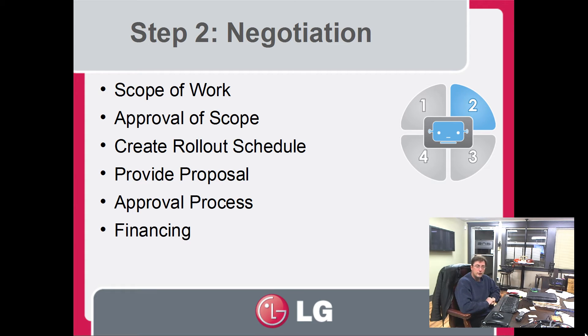From there, we do a scope of work. Once the approval has been put together for the scope of work, then we do a rollout schedule, provide a final proposal. Once it's approved, look at financing and do the rollout.